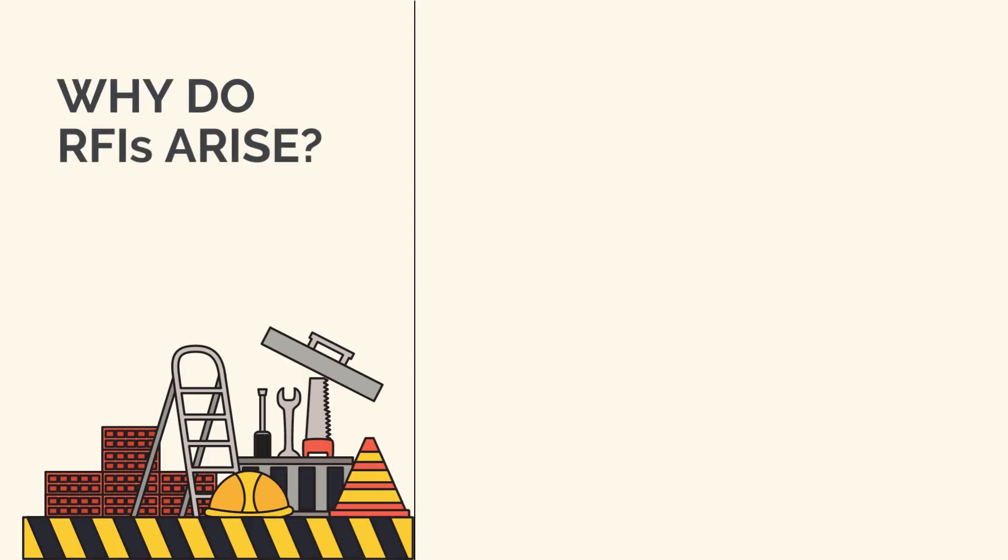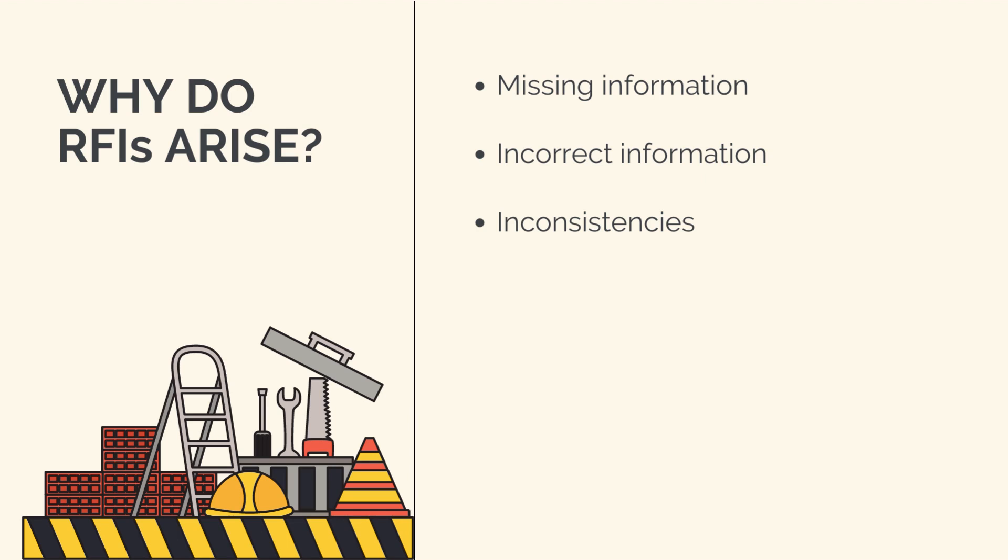Why do RFIs arise? Well, there are several reasons, including missing information from the design, incorrect information, inconsistencies between drawings or supplied information, clashes between objects, and value engineering proposals.